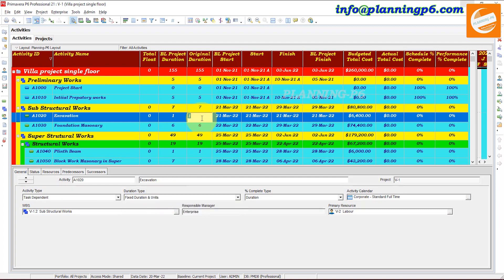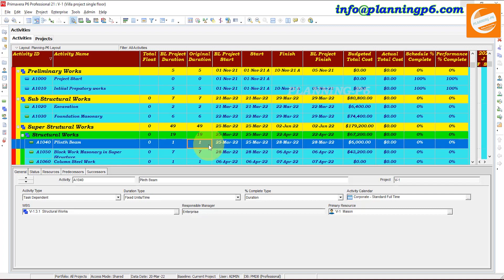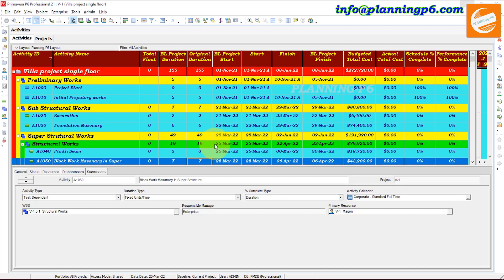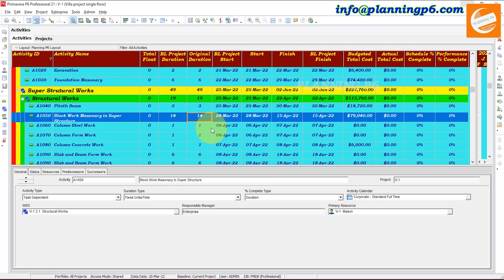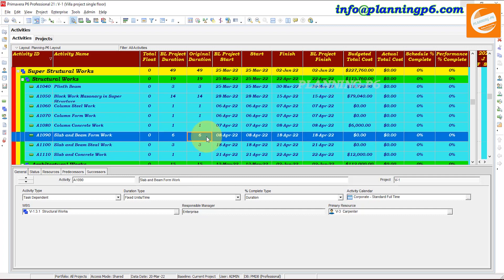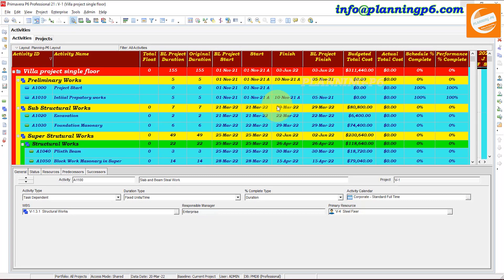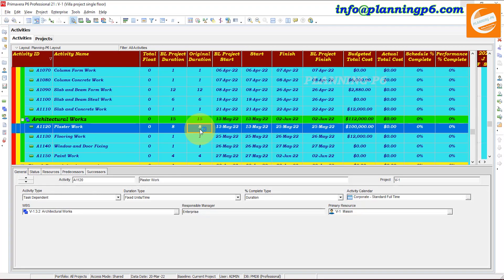Fix duration per unit — now the duration has been increased but the cost is frozen. You can do it like that. Now we need to add some duration to reach our target: 14 days to some activities, 12 days to others, six days here, and 16 days to another. Then schedule it.